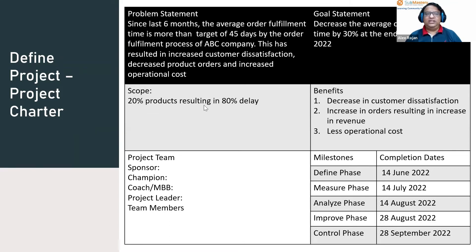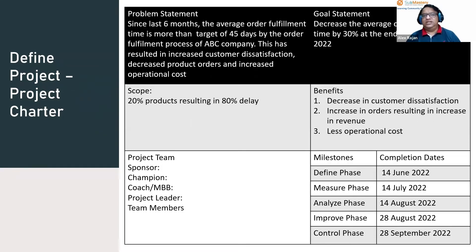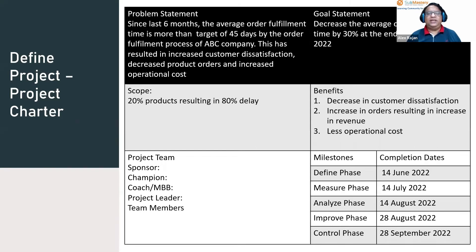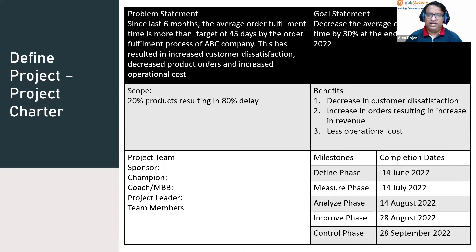The scope of the project defines where the project process will focus. We may not be able to focus on all delays or all products, so we try to focus on which products are resulting in 80% of the delay. That is where the Pareto principle is used — focusing on the main pain areas contributing to the problem. So we focus on the 20% of products resulting in 80% of the delay.